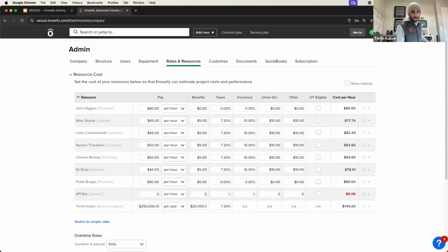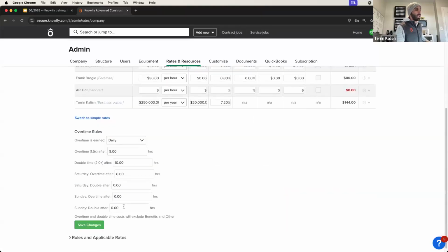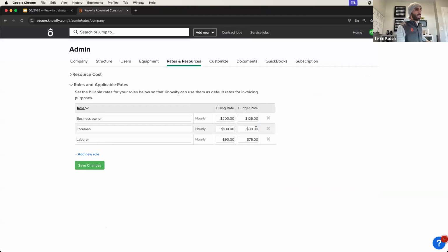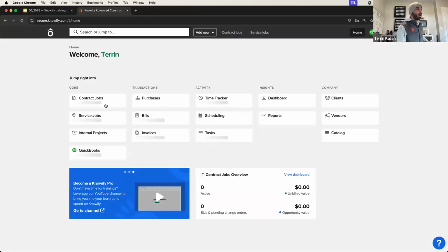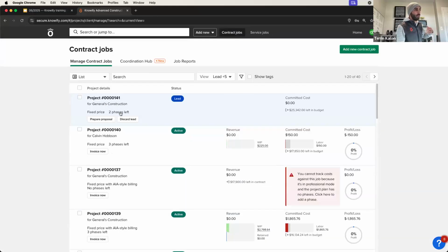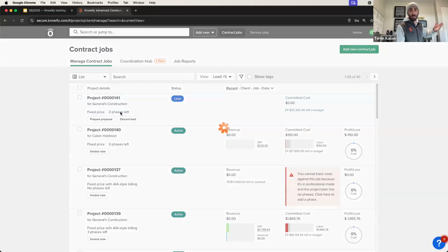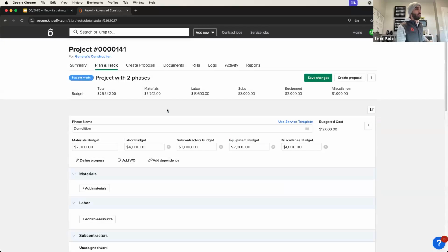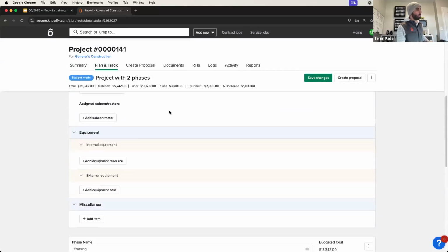In a lot of places, that's okay. But I think there's something to be said about setting up a manual budget rate and maybe going a little over average, or maybe set your budget rate to the most it could possibly cost you. That way you have a better chance of staying on budget when you actually track if everything goes as expensive as it possibly can. That way, in the worst of scenarios, you're always covered.